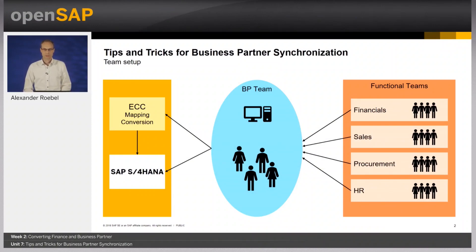Once you start planning a conversion to SAP S4HANA, you have to think about your project organization. I personally recommend building and establishing a dedicated team, or at least assign a person that is responsible for business partner and CVI topics during your conversion project. This is a cross-functional team that communicates with all parties making use of customer and vendor master data.